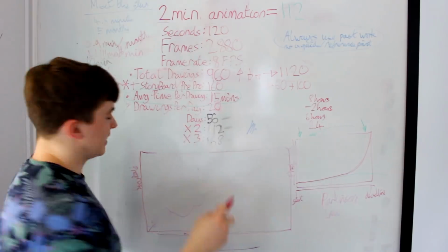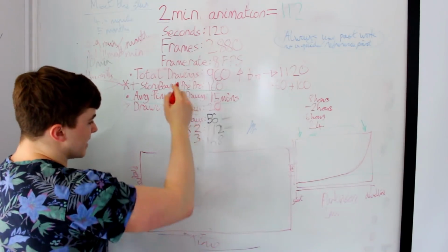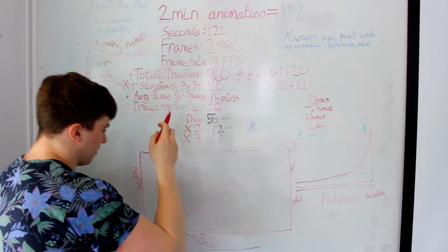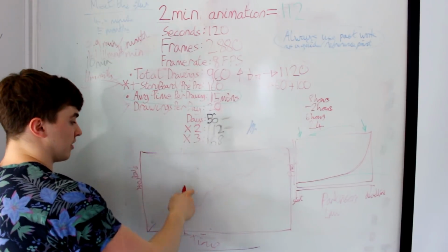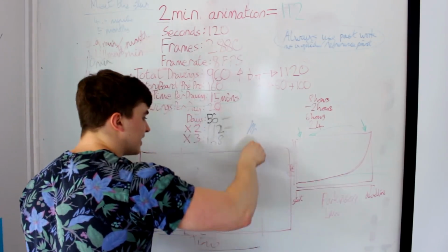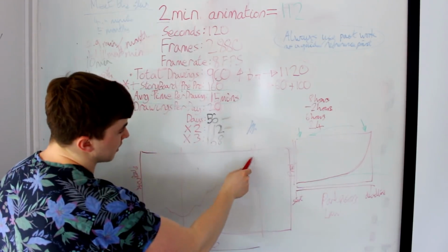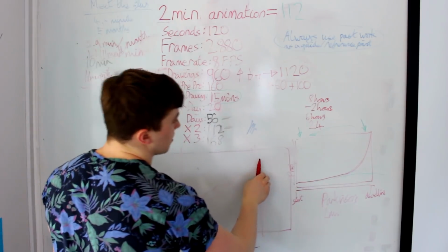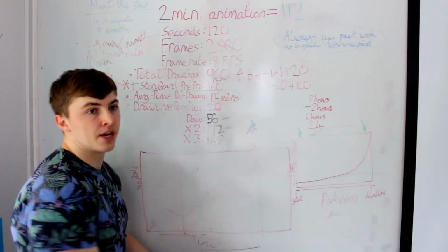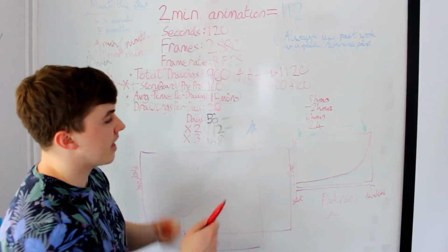What I would suggest is to create deadlines. So draw a line through and say on this day, we stop pre-production and we move into production. On this day here, this is our deadline for production. Production needs to have finished and we go into post-production, which can be bringing them all into Premiere, doing color grading, that kind of thing.